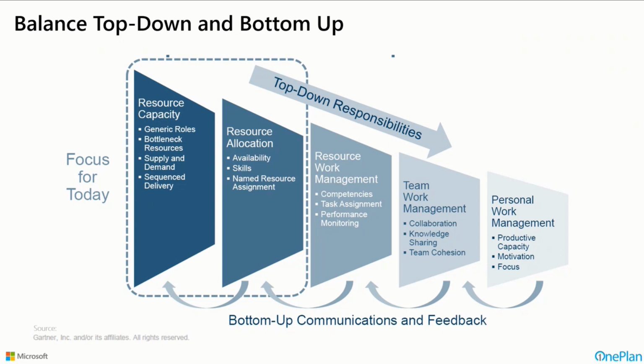Now, many organizations aren't ready to do that yet, but some organizations do a combination of those two things. They might only do bottoms up, or they might only do top down, but some maybe do top down early on in the life cycle of a project, and then when they do actually have a detailed schedule, roll that up and possibly even compare those two things such that here was our assumption from the top down very early on. This is what the detailed schedule says the actual plan is, and then see how much we vary from those things and reconcile accordingly.